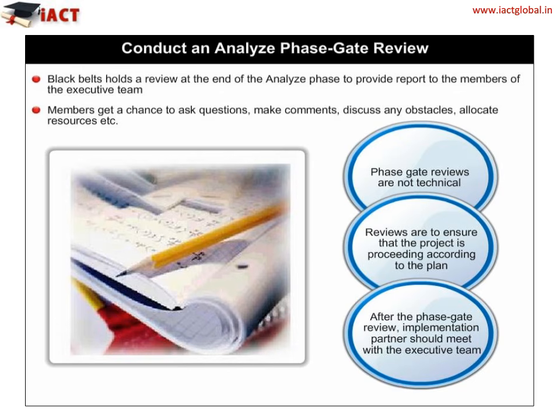Analyze phase gate review. We have arrived at the conclusion of the analyze phase. It is time now for the black belt to hold a phase gate review. The black belt presents a detailed report to the executive team on the status of the project. With reference to the report, the executive team may raise queries, make critical observations, discuss ways to overcome hurdles, allocate resources where needed, provide reinforcement to the project team, and ensure that the project is on the right course.